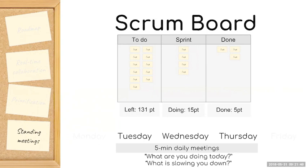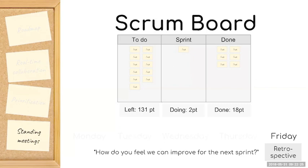Tuesday through Thursday, we have five-minute daily standing meetings. Scrum is intended not to be intrusive and not to involve micromanaging. Because you're a team, it's hard to throw anyone under the bus — everyone's working together. The idea is we meet less time but more often. In these meetings, we're only asking two fundamental questions: what are you going to work on today related to the sprint, and what do you think is slowing you down — how can we make you faster? At the end of the week, we have what's called a retrospective, where we talk about how well the project is moving and what can be improved, reviewing impediments discussed during the week. In this case, I was able to get 18 points done with two points left — I didn't quite hit my mark, but I might take fewer points next sprint to make sure I get it all done.